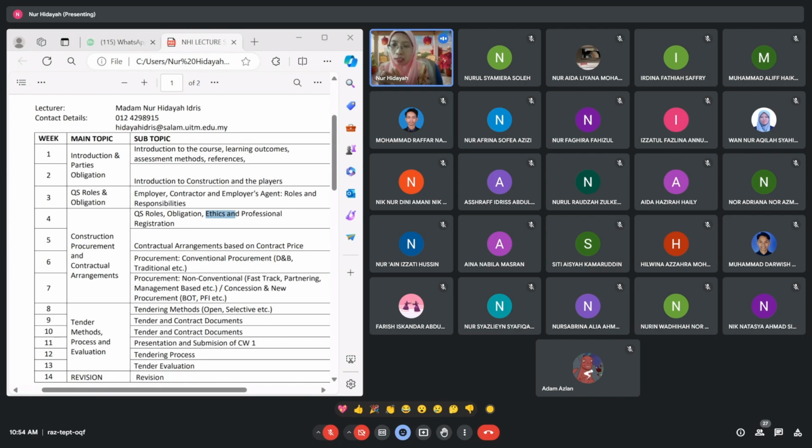If you look at elemental, from piling, pile cap, we use concrete. Then in work below, we use concrete. In upper floor, we use concrete. In frame, column, we use concrete. Right until the end of the elements of BQ, every one uses concrete. Even in the professional sum, if you build a concrete bench for landscaping, there is concrete usage, right? So in that case, you will lump all those concrete works usage into one trade. So the header will be concrete works.